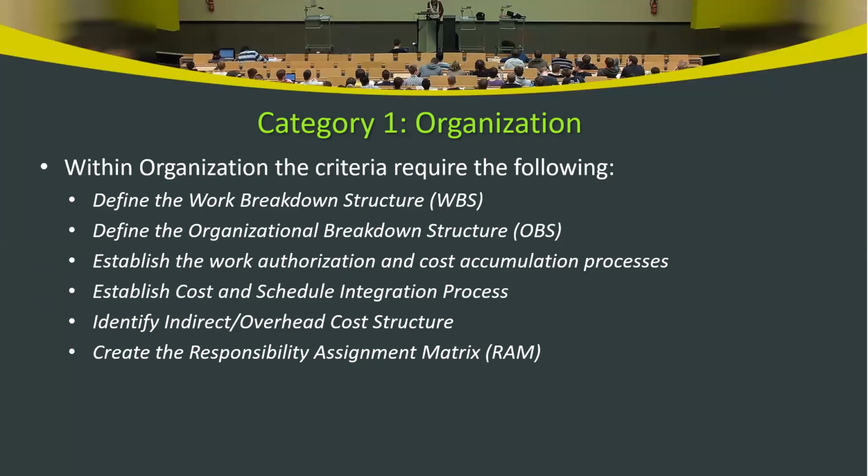Work authorization processes involve the formal approval to start work on a specific task or project activity. It ensures that tasks are only initiated when properly authorized. Usually, when a change request is initiated and approved, the work corresponding to authorized changes is done through work authorization processes.